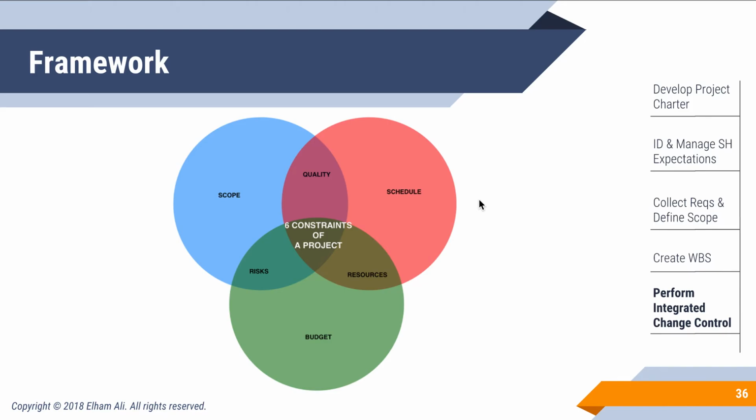And I'm providing you with the top 6 constraints of a project that I've always been cognizant of. And so the top 4 reasons why scope creep happens: one, and I mentioned this before, is that stakeholders don't necessarily understand how to balance these 6 constraints of a project. Second, stakeholders have been conditioned to expect that adding functionality to product scope won't affect your project work, when it actually does. The third is that usually project requirements are not clear for every stakeholder. That's why it's really important to involve everybody in the initiation of the project. And the last is that there is a lack of effective change management, and that's something I'll touch upon in the next few slides.